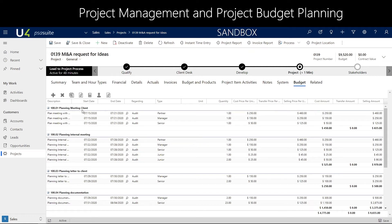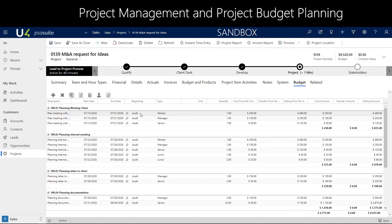For example, the planning meeting with the client consists of three activities that you need the audit team for, within a specific role. A specific role holds a specific rate: a selling rate, a cost rate, and also for internal purposes a transfer rate if needed.